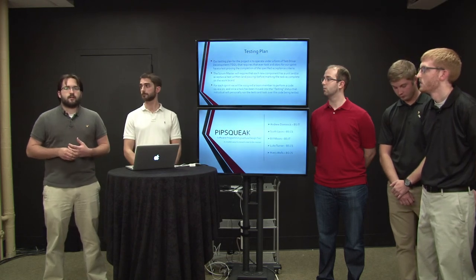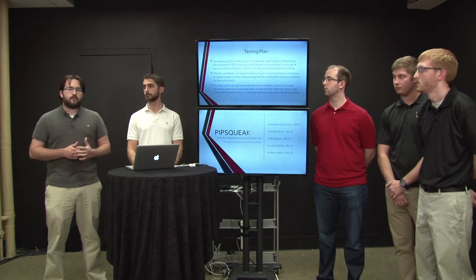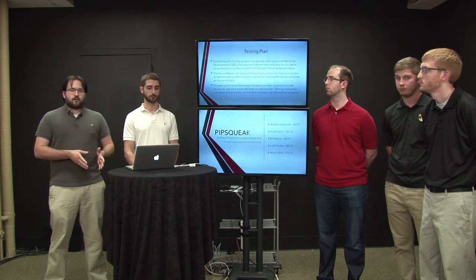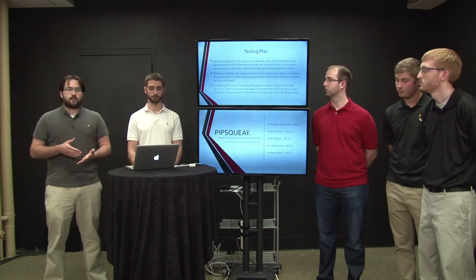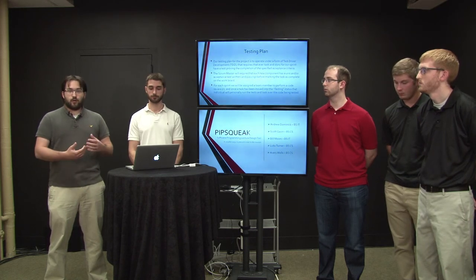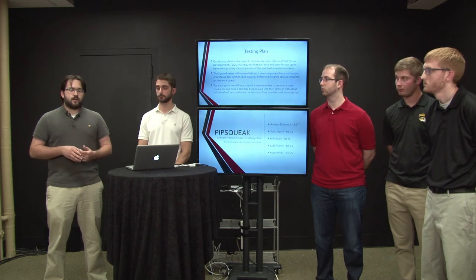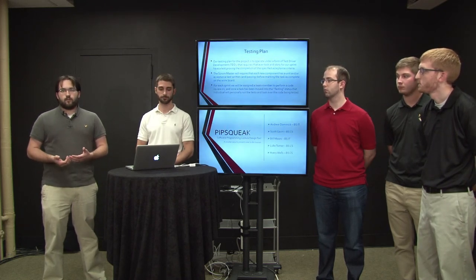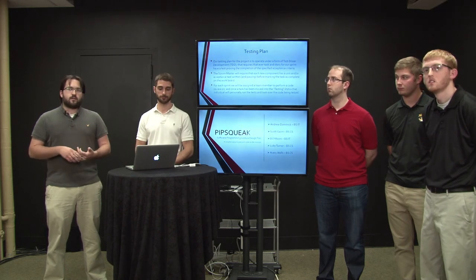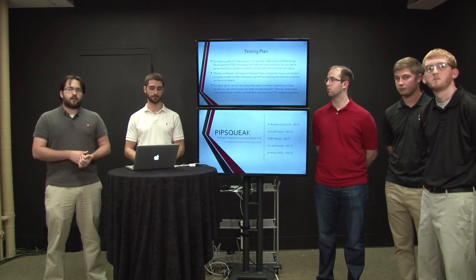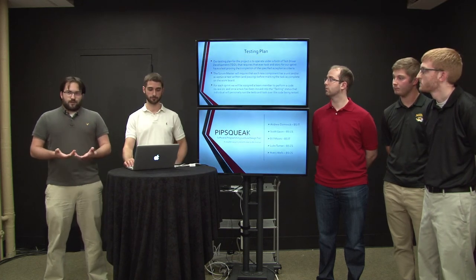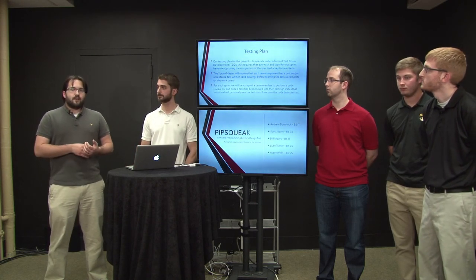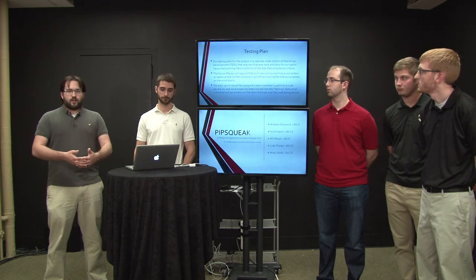Since we're going to be using a lot of new tools not familiar to all of us, we're going to implement a form of test-driven development. We're going to assign stories and tasks as part of the Scrum methodology, and then each sprint, we're going to assign a person to code review another programmer — switching that up so you're not always reviewing the same person. You'll write your tasks, write your unit tests, and then someone will code review and move it into the testing board. The product owner and Scrum master will then make sure all acceptance criteria are met before marking it complete, ensuring code integrity and that any changes don't break prior sprints.